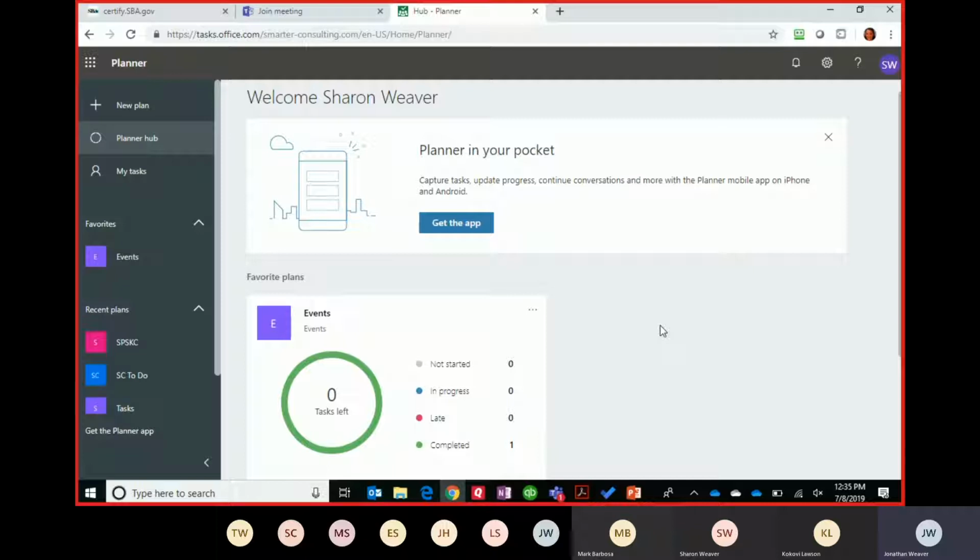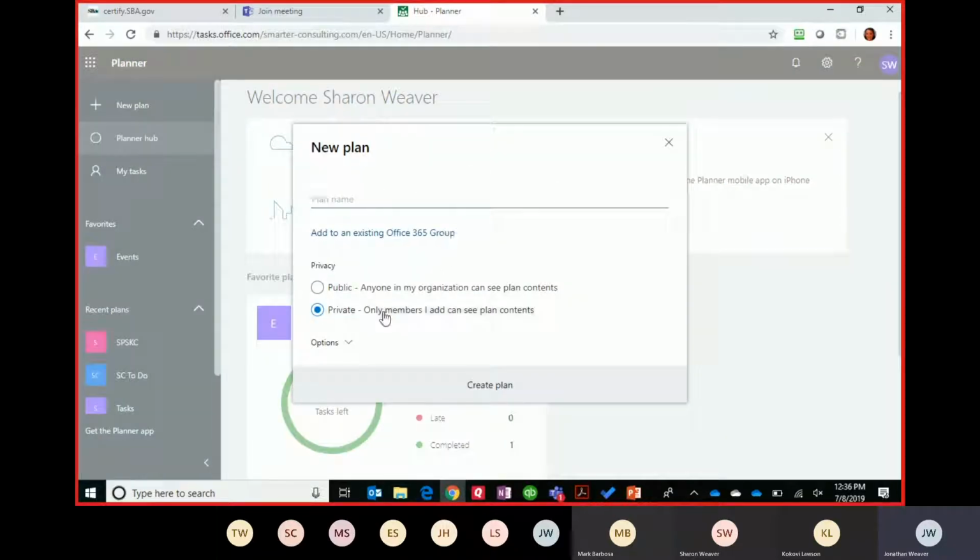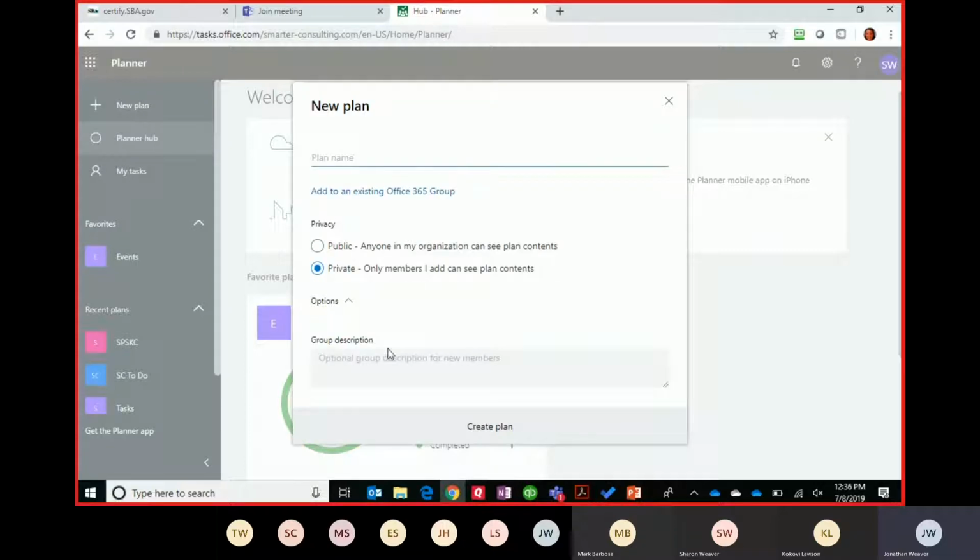So I'm going to show you this way first, and then I'll show you in Teams. So first of all, I see how I can create a brand new plan. Doesn't have to have anything to do with anything else. All right, I can create just a basic brand new plan from here. It's going to ask me what it wants me to call it. Is it public or private? And do I want to put a description? It's that easy to make a plan. It's that easy to delete them too.